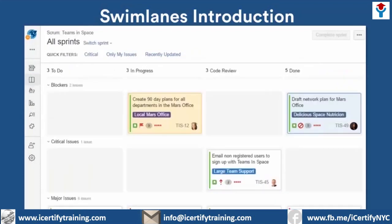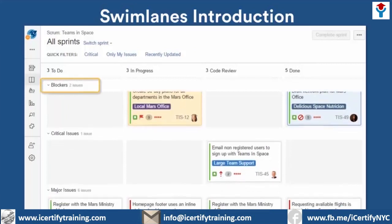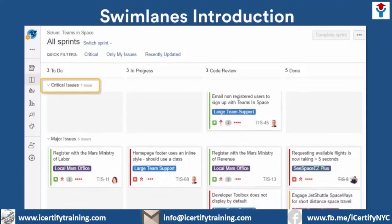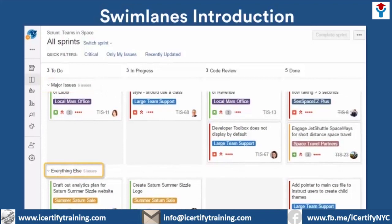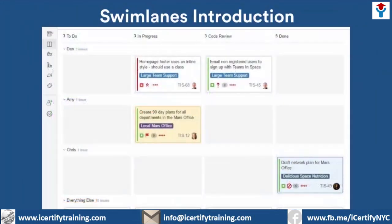Here we use swim lanes to pull together items by importance. That way we can see where our highest priority issues stand at a single glance. My team's board is set up to show issues labeled as blockers first, followed by critical issues, and then major issues. The rest of our issues are put into the everything else swim lane at the bottom of the board. Another popular configuration is to group issues by assignee, so we can see exactly what everyone is working on and their progress. This helps us watch out for bottlenecks and overloaded team members.